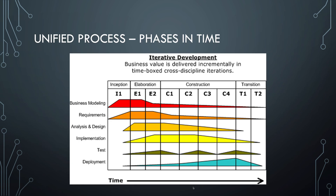Here you see an overview of all the phases discussed. Just like in a waterfall model, the main phases do not overlap in time. However, activities such as designing, implementing, or testing are spread out over these phases and their focus changes depending on the phase you're in. Business modeling and requirements analysis are mainly done in the inception and elaboration phases. Implementation is mainly done in construction, but also in earlier phases focused on prototype implementation. Testing happens throughout all four phases. And deployment — making your system operational — plays a major role in the transition phase and a minor role in earlier phases, more aimed at deploying prototypes and getting user feedback.